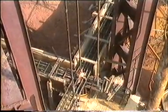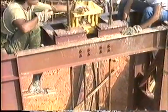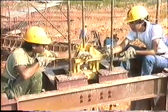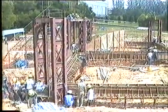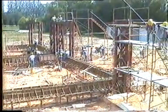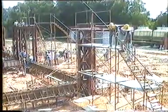On each frame, we have to position 3 high-strength lifting rods. They stretch from the intersection corners of the tie beams to the top of the steel frame, where we have this lifting chair, which is actually the base of the hydraulic jack. At this stage of the construction, the 8 lifting frames for the 2 roof structures are now in place.